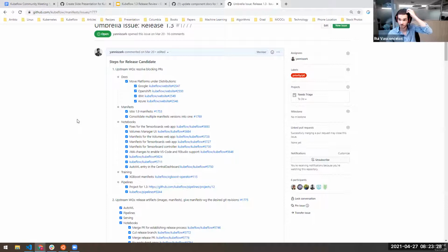And that's great work. So it would be really good to document that, so that the next people who take on that effort can replicate it. And everything like a draft schedule as well. I think we realized in the last plan, we only gave distributions a week of testing, right? And I think they ended up using 3 or 4 weeks. And even then it was really tight at the end. So maybe we start with 4 weeks and plan backwards from there, and make it clear to the working groups when their last freeze is and what feature freeze is and all that kind of good stuff. I think that would help tighten up the process more.